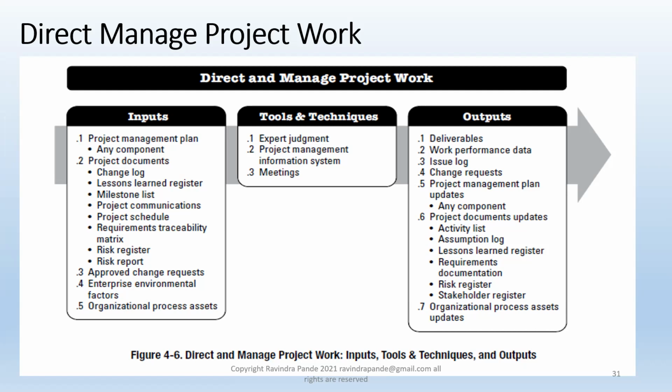So the change log, whatever we have adapted, changes from a Word document to an Excel sheet. Yes, please mention that. Normally in most organizations, the change log is an Excel or CSV file, a comma-separated file, where you open that file in Excel, the columns are separated, and you keep adding whatever changes you have accepted and approved